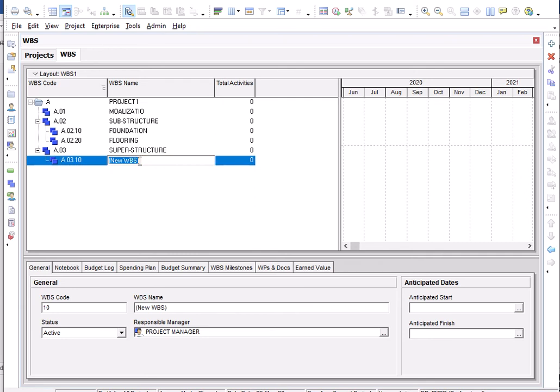It is ground floor. We will start on this ground floor because all the activities under this ground floor are typical to the other floor, so we can copy paste for the second floor, up to 20.